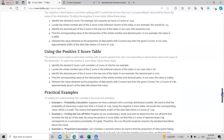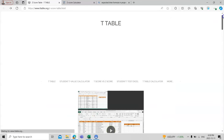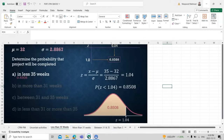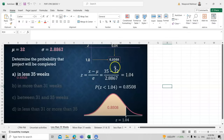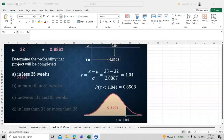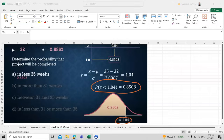Formulas are shown on the table as well. Coming back to our question, using z = (x − mu) / sigma with x = 35, we get a z-score of 1.04. Looking this up in the z-table gives a probability of 0.85, meaning there is an 85% chance of completing the project within 35 weeks. Graphically, this corresponds to the area under the normal distribution curve up to that z-value.